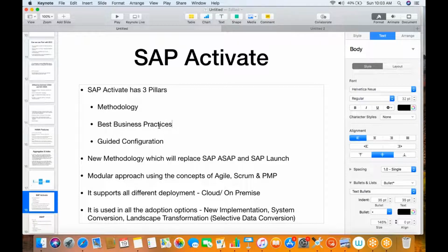Okay, okay. But I was just thinking again, you don't need to wait till 100% is completed. See, normally what we do in the normal implementation approach is we get all the requirements and we take 1 year of time, 1.5 years of time because we want to develop all the things and we want to do the big bang go-live, right? In one go. In this case, SAP is recommending don't do that because what will happen unnecessarily is you'll not be able to realize whatever things are fitting your requirements for the next 1 year. At least whatever things are fit, go ahead with that and then slowly keep on upgrading your system.